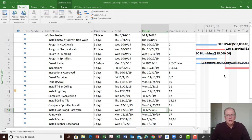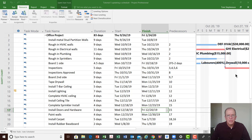If you're behind schedule you look at — well, we're five days behind, how are we going to get that five days back? We'll talk about that in a different tutorial. Right now I just want to cover the basics of the updating process. The first thing you need to know is you need to have developed a baseline schedule. The baseline schedule is the plan for the project — this is what you do before you start, and once you've reached agreement that this is the plan, you move forward.